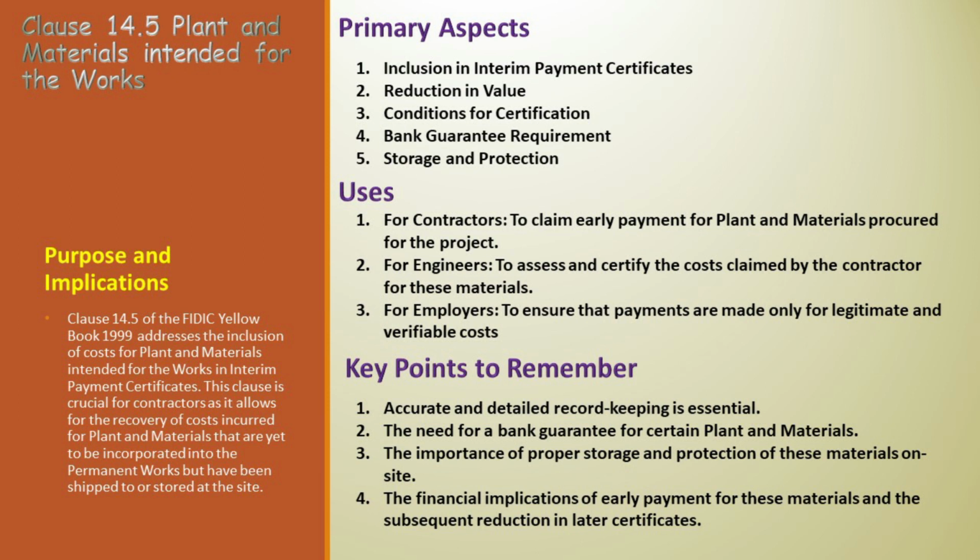Bank guarantee requirement. For certain plant and materials, especially those listed for payment upon shipment, a bank guarantee is essential. This guarantee serves as a financial assurance until the materials are properly stored and protected on site.